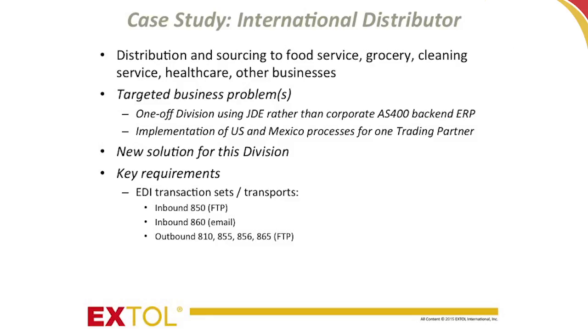The second piece is that business buy-in is critical in this project, and any project for that matter. When we integrate with JDE, for example, Xtol is an application. We have our EBI application that needs to integrate with the JDE backend. So there are some JDE consultants on site that are working. If we don't have the corporate buy-in from our customer, and the project management or the leadership to keep those two teams on the right path, the project is set up for potential failure, in that the project is owned by our customer.